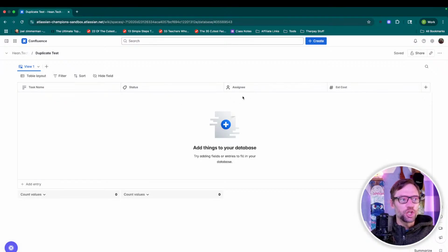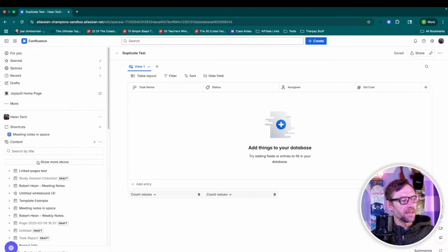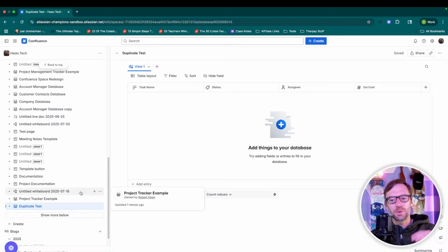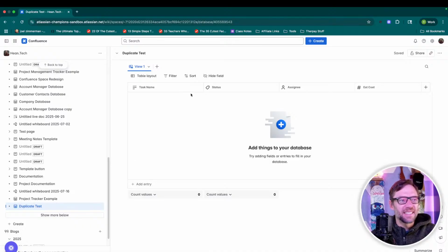So that's the basic tracker. Again, I would set this up if I have a mid-sized project, something that takes under 2 or 3 months of work and doesn't have a lot of interdependencies. Because for me, it's better to use that than a spreadsheet. And having it in Confluence, it shows up directly in my sidebar, in my nav, and can be put in context with other information, which is a very powerful use case. It's worth it for me in that sense.